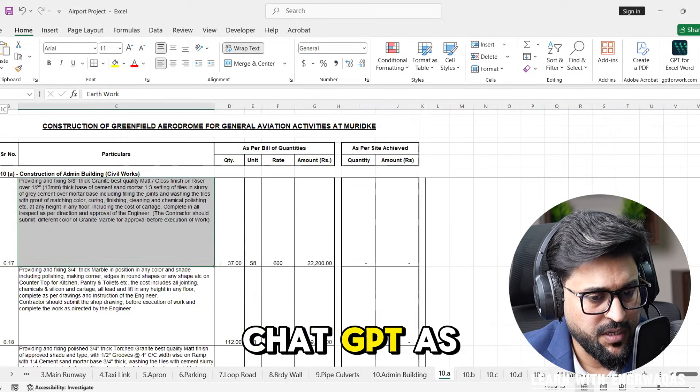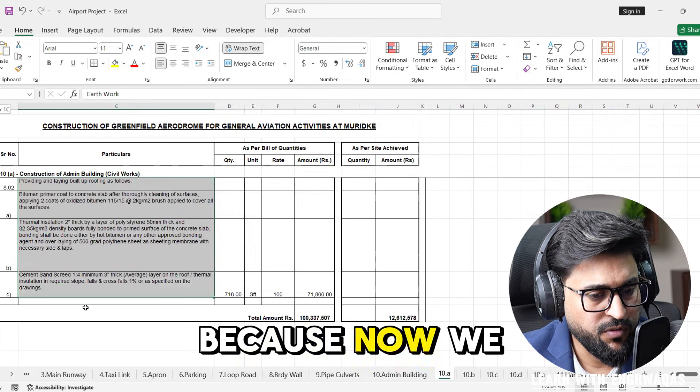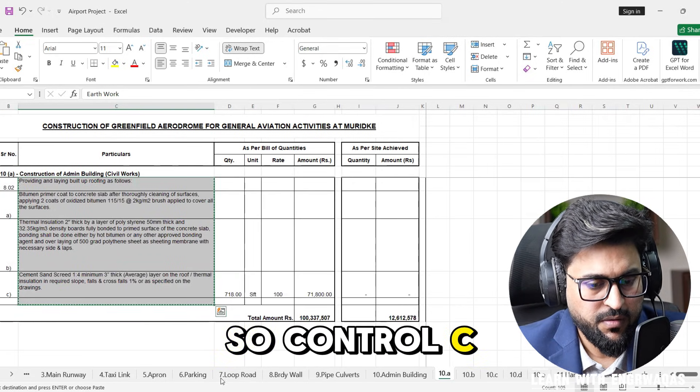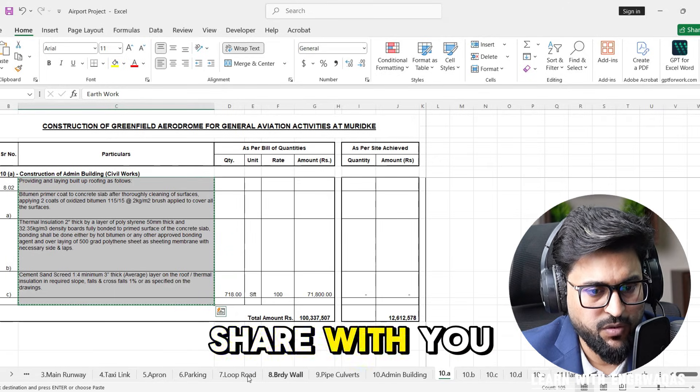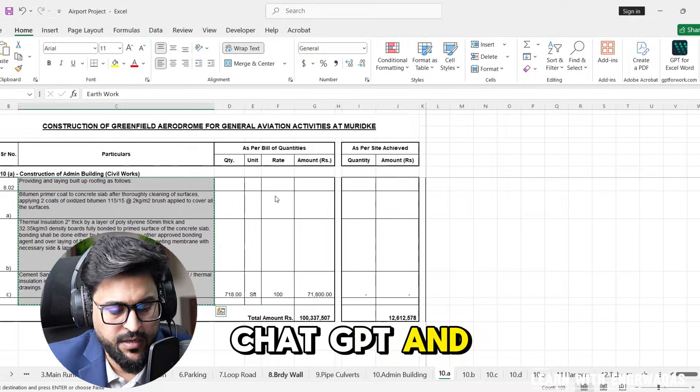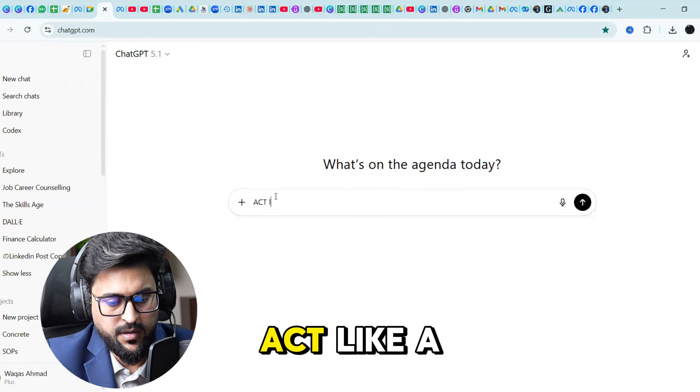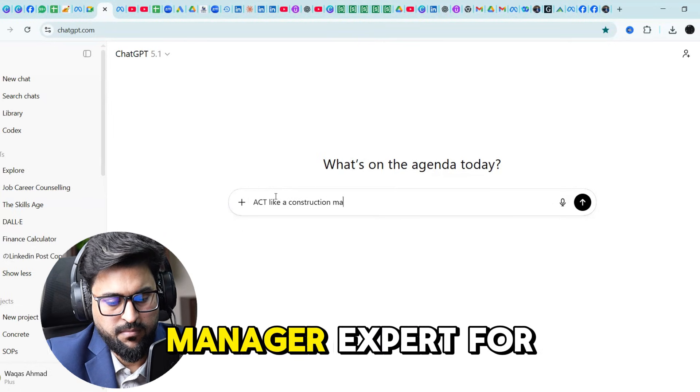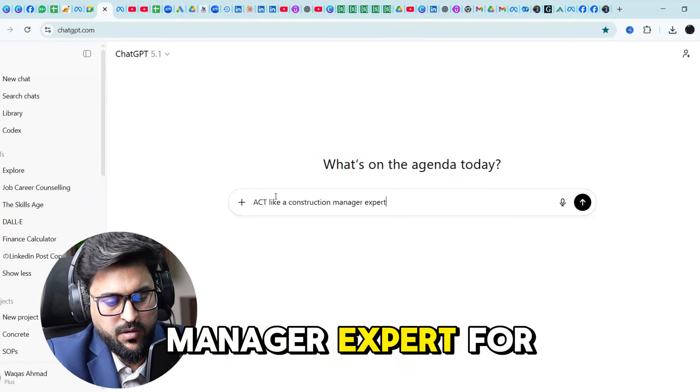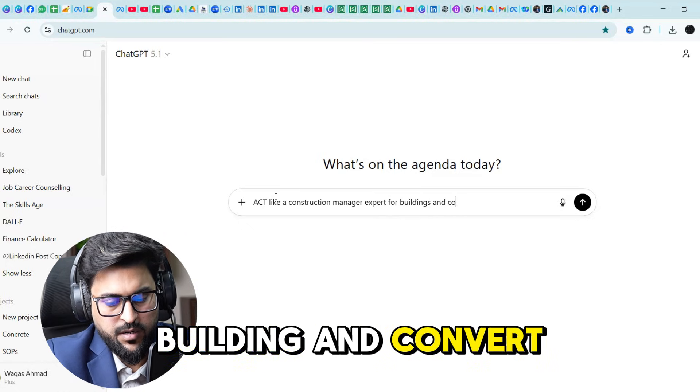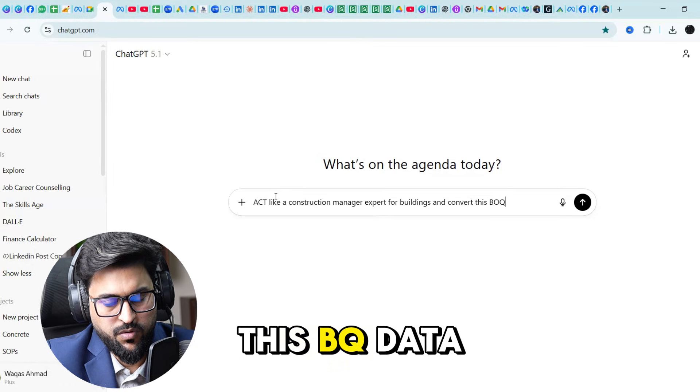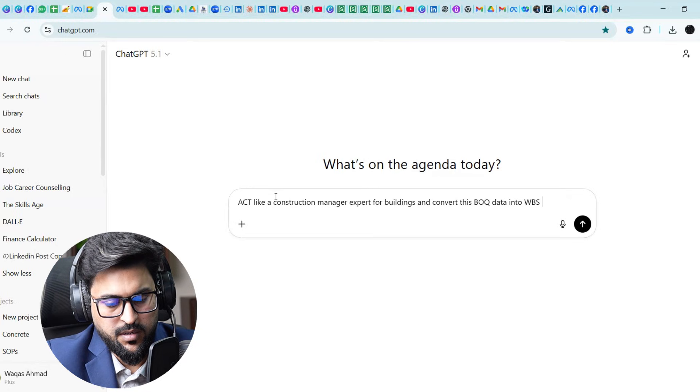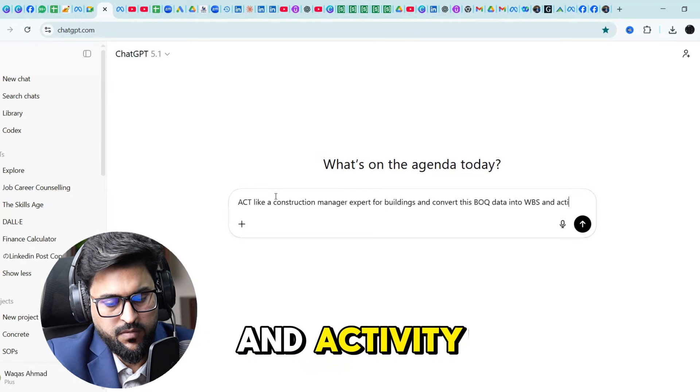I'm going to share with you, just take this one. I'm using chat GPT. You can also use this because now we are living in AI era. So I'm going to share with you, here is chat GPT. Act like a construction manager expert for building and convert this BOQ data into WBS and activity in node format.